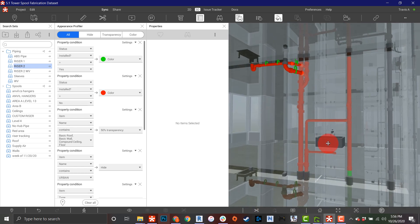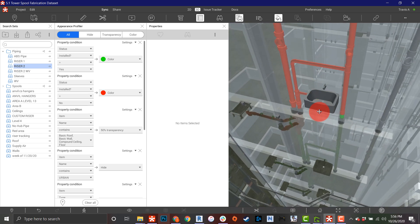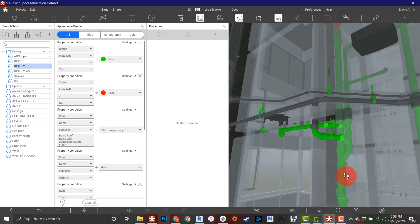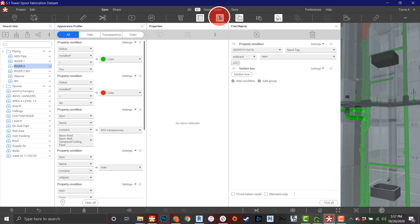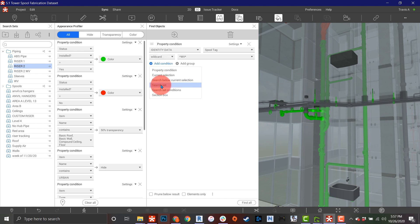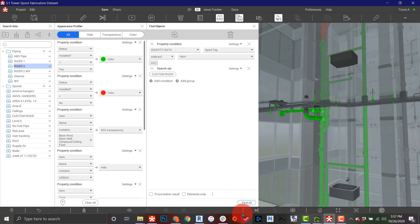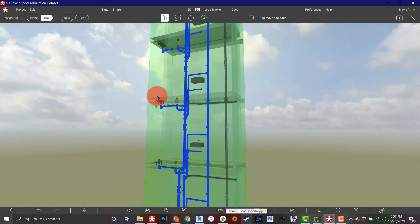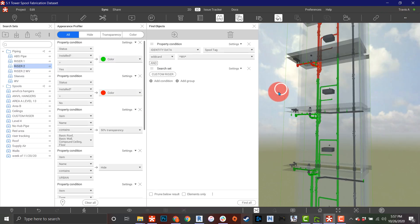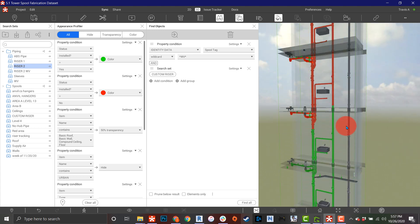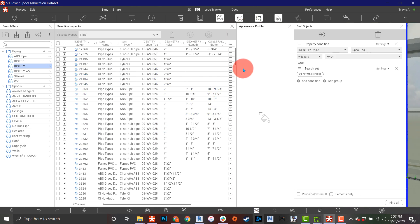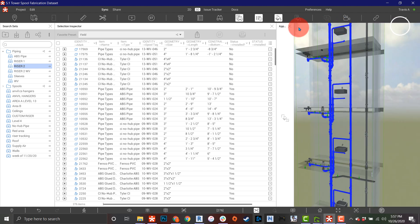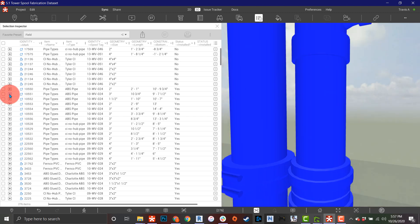Really simple easy way to start tracking status using Revisto. If I ever want to get back to that, I'm going to come in here and use my find item dialog again. Let's say I want to get back to that entire set - I'm going to go to search set and use that custom riser one that we saved earlier. I'm going to find all, I can quickly crop that down again if I want. Now I can walk around this thing - if I click off of here I can walk around and see how far we're installed real easy. I can also come in here and say find all, get my selection inspector again. I'll be able to come down here and see my status property right here, so I could see specific pieces and parts.